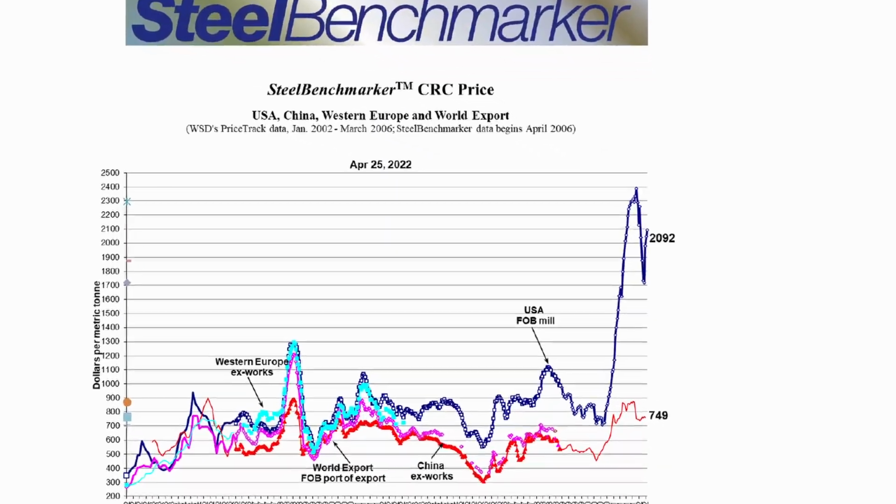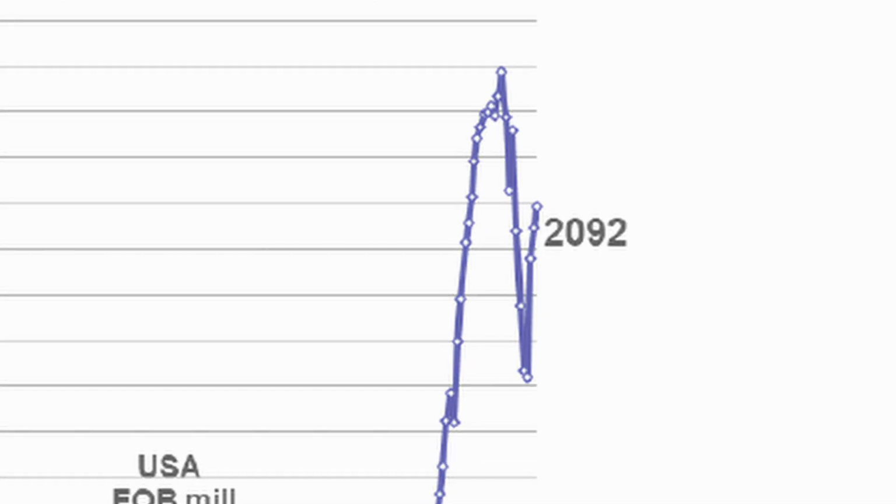Right now, the domestic mills have full order books, and they appear to be sitting back. Lead times are extending, and actually up until last week, Nucor's Tuscaloosa plate mill hadn't even opened up purchasing for May. To give you an idea here, Great Western has 2 rail cars, or almost 200 tons, of plate products to purchase for May and June production. Fortunately, we were able to secure the steel last week, although we did have to pay a significant surcharge to get it. Since the onset of the Russian invasion, spot pricing that is available has increased by over $400 a ton. This is pretty much the most current data I have, and it's about 2 weeks old.